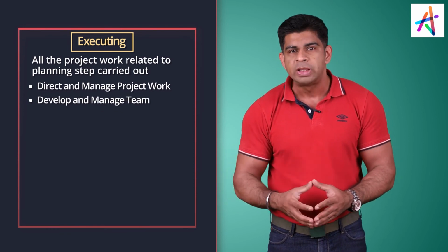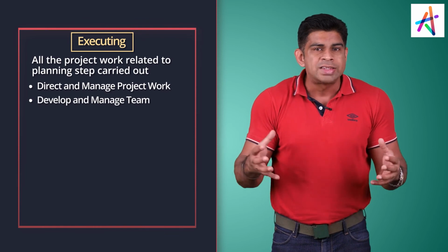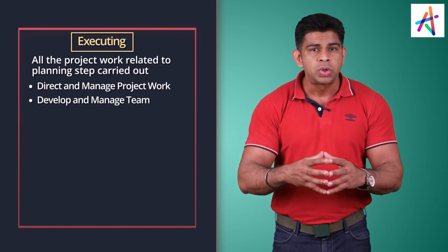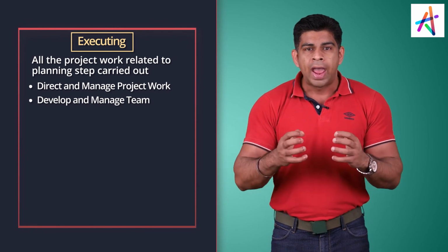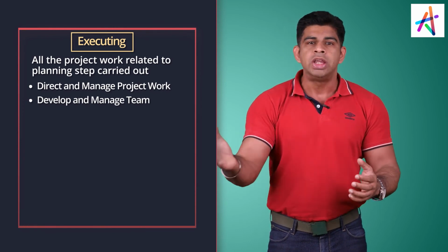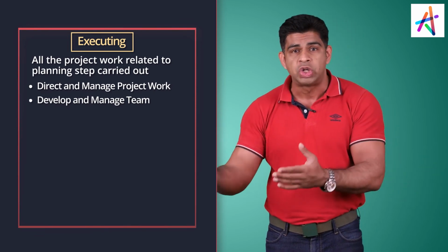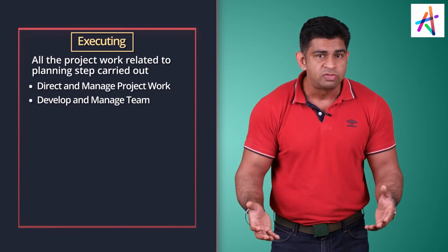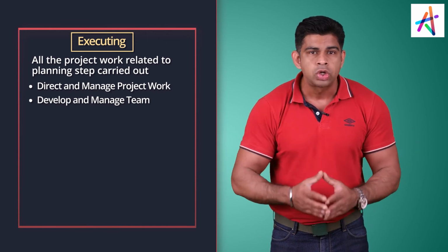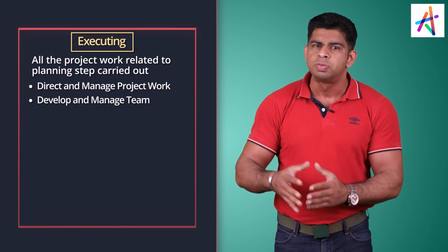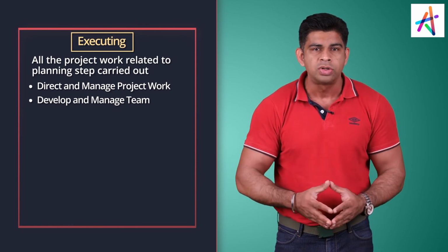What do we mean by developing the project team? The team, when it's initially formed, is a set of individuals. They need to be united together so that they can work together as a cohesive unit and rely on each other's strengths. So we take them off-site. We ensure that they gel together. What is the best method of developing a team? Co-location, which is also called tight matrix. Again, this is something which we'll cover in the resource management chapter when we go through the entire course.